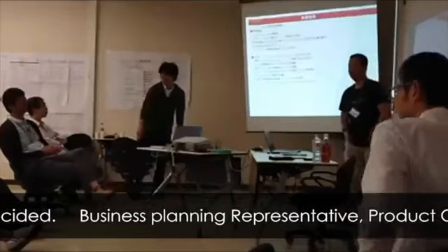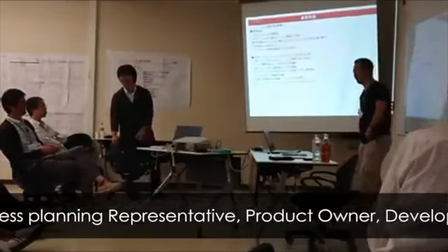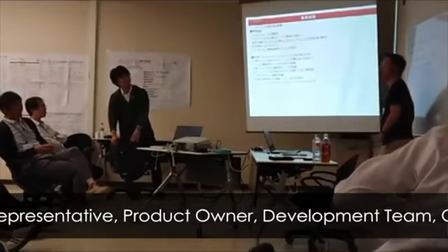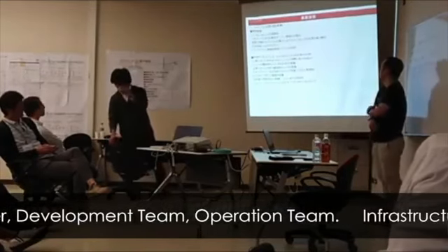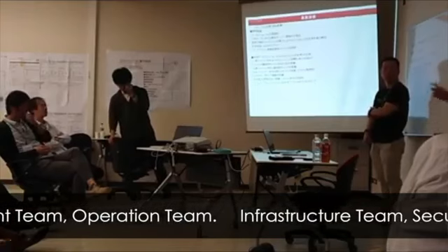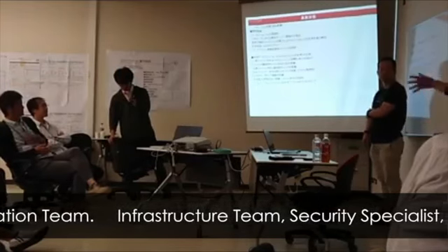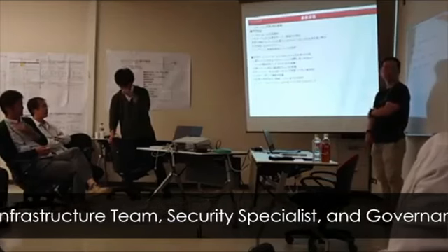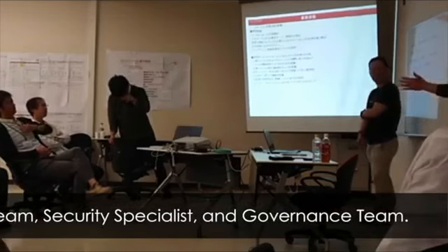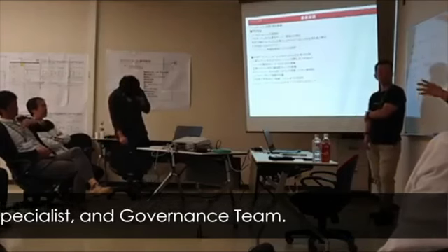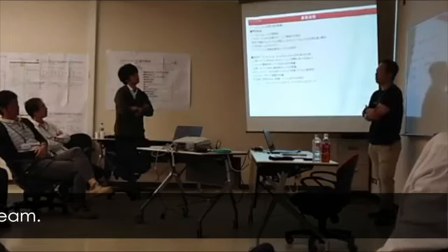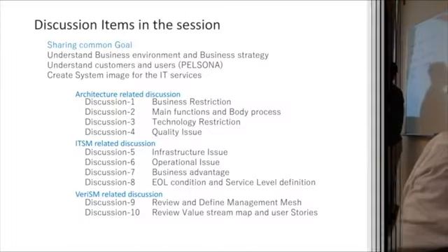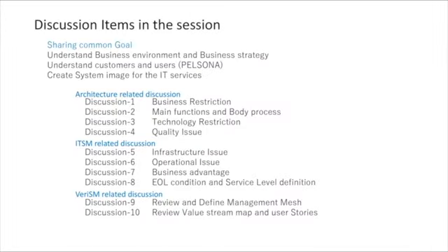This session used the CPS practice. CPS aims at creating a complete action plan with full consensus in the team. It applies a technique of group dynamics, which is communication, conflict, creativity, consensus, and commitment. And it gave us an efficient discussion with fully controlled discussion practice by the session leader. We designed the discussion with a time box as in Scrum. A 1-hour time box creates concentration. We discuss one subject at a time, and a decision is made with unanimous agreement.